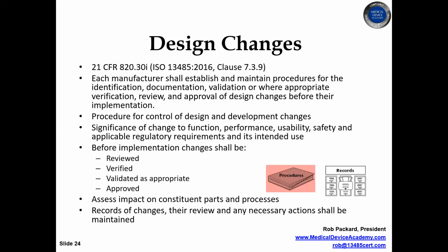For design changes, this is another clause that's included in there. The FDA now, well, not only does the FDA require that you conduct design changes, but now the ISO standard requires you have a procedure for this. And so our procedure is SYS 006, and this is where you're documenting whether the change is approved or not, but you're also documenting all the verification and validation testing that you did.